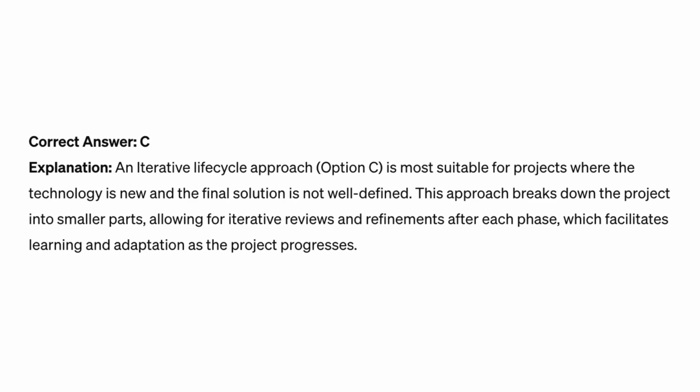Correct answer, C. Explanation: an iterative lifecycle approach, option C, is most suitable for projects where the technology is new and the final solution is not well defined. This approach breaks down the project into smaller parts, allowing for iterative reviews and refinements after each phase, which facilitates learning and adaptation as the project progresses.